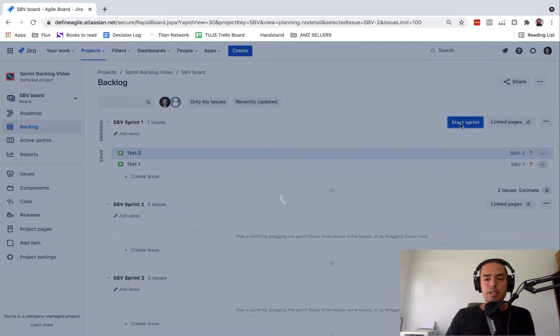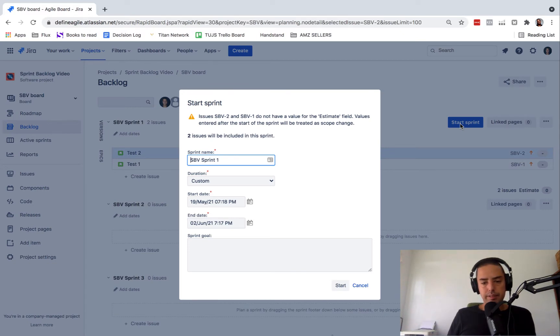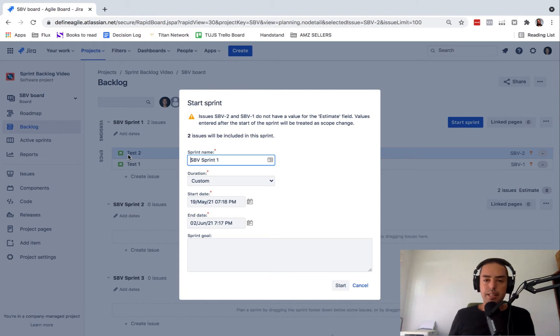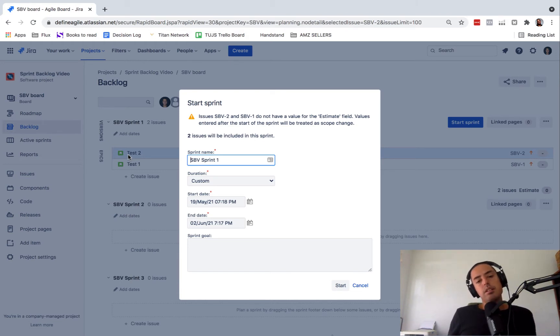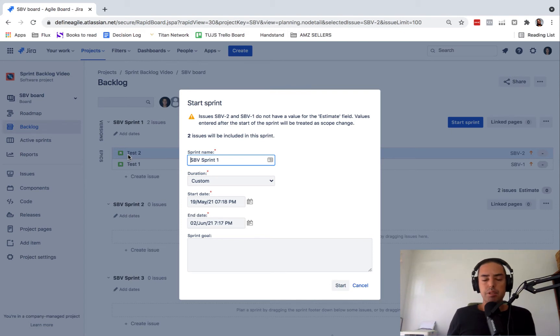So now I click on the start sprint button and it tells me a couple of things. First of all, it says they're not estimated. It's very important in Scrum to estimate things because then you can track your velocity and see how well you're doing. So make sure you have story points assigned if you're using story points. If not, all good.